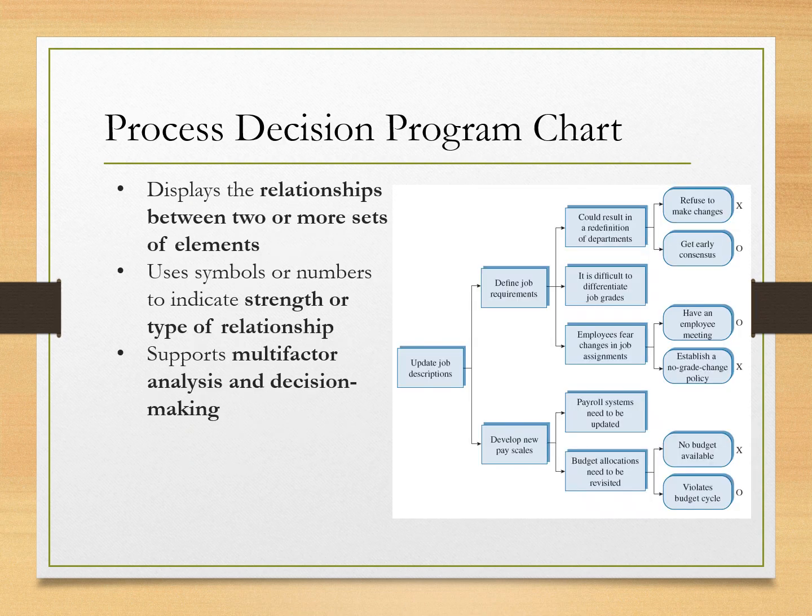One of my favorite tools is the Process Decision Program Chart, or PDPC for short. No matter how well we plan, things can go wrong. The PDPC helps us stay proactive by identifying possible problems before they happen. It's like playing what if with your project. What if the supplier is late, the equipment fails, or the staffing falls short?